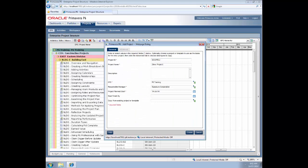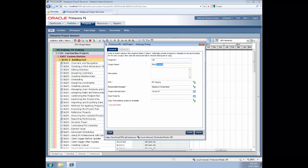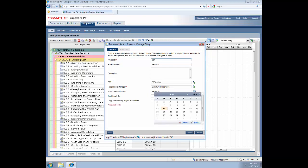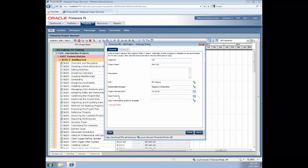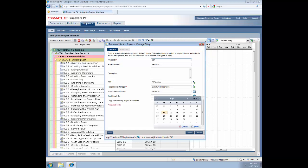That will bring up this dialog box where we can put in the necessary information. So our project ID is going to be 'car' and the project name is 'new car'. You could give it a description if you wanted. Which node do we want it to go in? We do want it to go in the very top-most node, which is P6 training. So we'll leave it there. Who's the responsible manager? We'll leave that at the default. Plan start date - we need to worry about that, so we'll make it the 21st of July 2014. With a must-finish-by date six months hence.